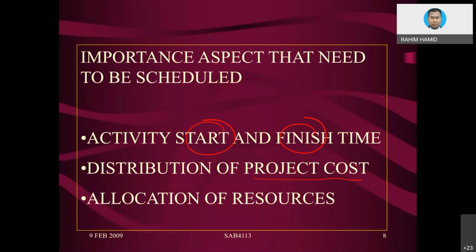Sometimes people ask, why do we distribute the cost according to activity and then monthly? What for? Well, this is what we call the accounting system. Every month, you keep track of your account. You do not want to be running short of cash in that particular month, and at the end of the day get protests from workers, subcontractors, and suppliers, because you thought everything was okay.